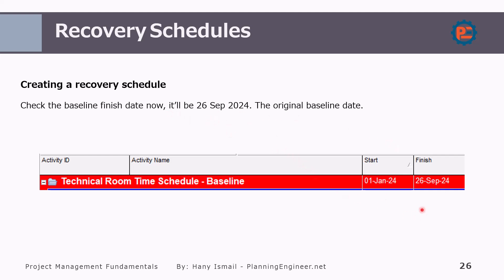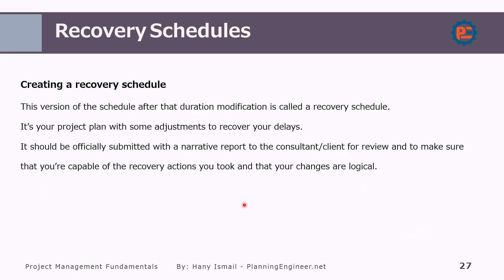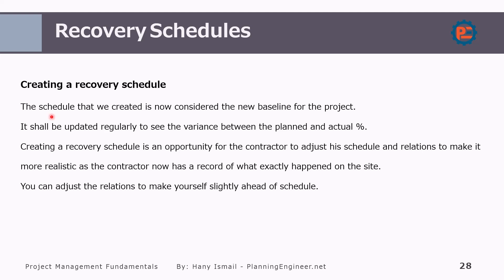You can enroll free in the course and download the course content. The version of the schedule after the duration is modified is called a recovery schedule. Once you create the recovery schedule, it should be officially submitted with a narrative report to the consultant or the client to tell them what you did. The narrative report is important because you want to tell the reader what you have done — don't rely on them to figure it out. The schedule we created will now be considered as our new baseline, updated on a weekly or monthly basis while you keep monitoring it.